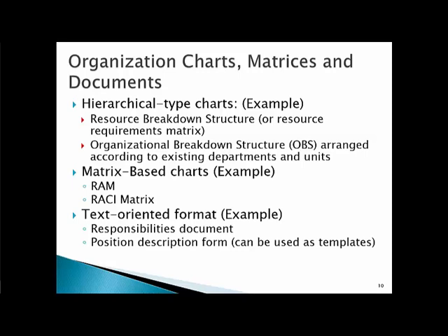Also, we can use the matrix based charts like the RAM, which is the responsibility assignment matrix, or the RACI, which is the responsibility, accountability, consultation, informed matrix. And then also we can use the text oriented format, where we can write all these responsibilities in a document as just a report or paragraphs that explains who will do what.